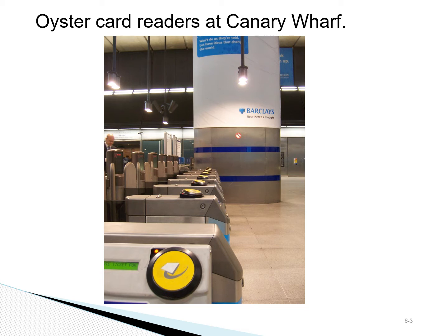When I was at US Courts, many of our projects had to be implemented for many different courts throughout the country. And because of that, we also chose the slow rollout, kind of waves of implementation, so we would minimize the risk. We would know those problems on a smaller scale, in fewer courts, and we deal with those quickly rather than impacting the entire system.